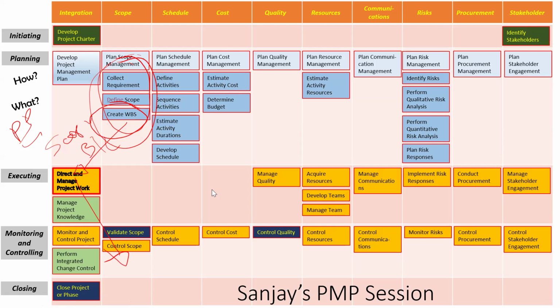Change, basically. There is a small difference here. You are right, it's a change, but there are two ways to look at change, Shishir. A planned change is not said to be a scope creep. An unplanned change is called a scope creep. If it is a planned change raised by the customer, you will raise a CR for that. This CR will get approved. If it gets approved, it becomes part of the scope baseline itself. Then it is not a scope creep. It's a change.